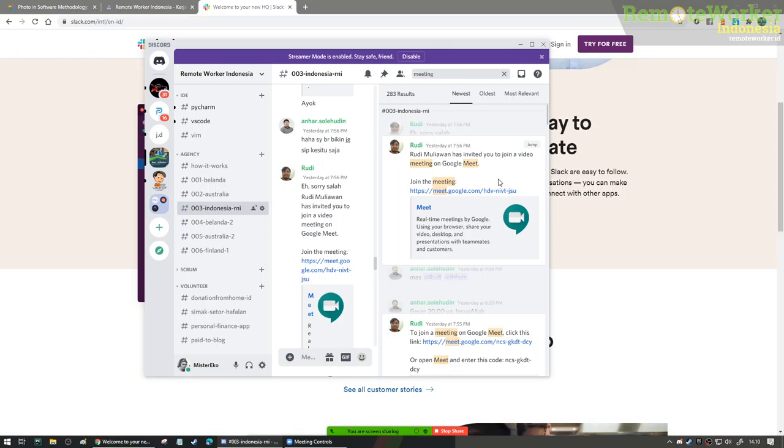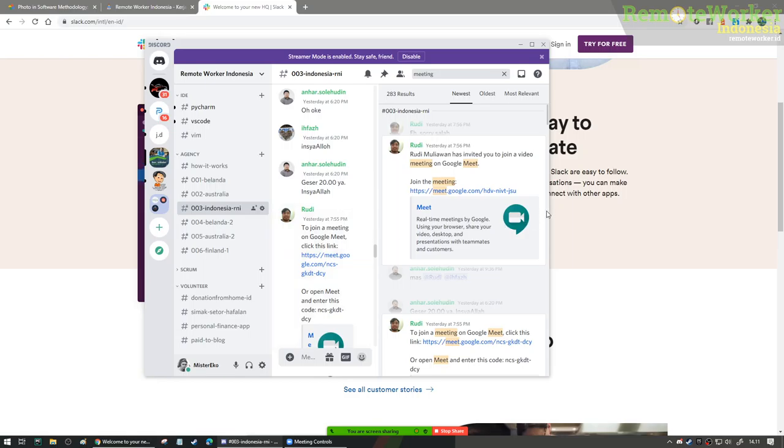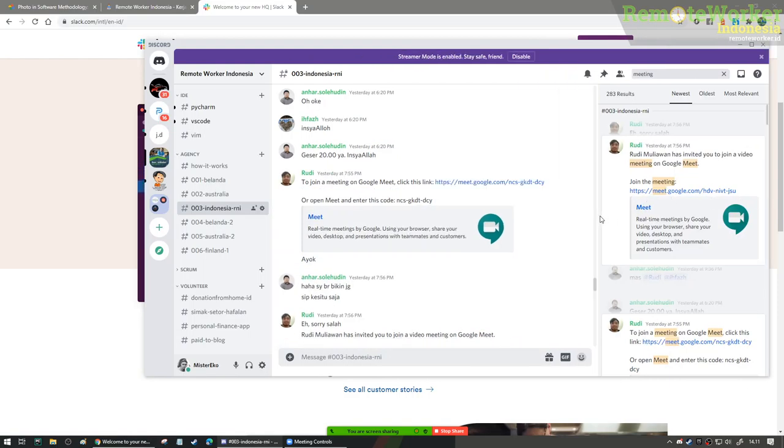In a Scrum, there are three things that you present to the Scrum Master. First, what have you done in the previous 24 hours. After that, what are you going to do in the next 24 hours. And third, is there any obstacle that you encountered in the previous 24 hours. Only this. You don't do the curhat, you don't gossip, you don't talk meaninglessly. You really just do these three kinds of talk, because it will make the meeting effective, even though you never meet everyone here. I really never met anyone here at all, because they are surely in another city, probably another island too.